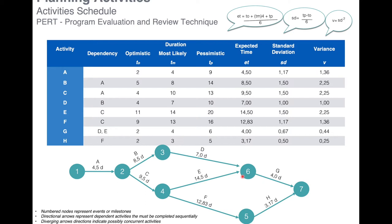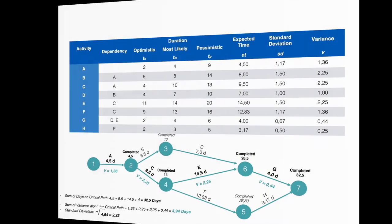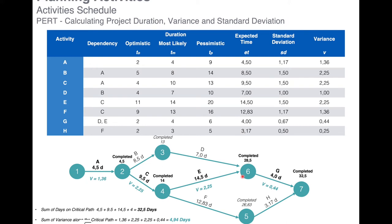Once we've calculated all values, we find the duration along the critical path — the longest sequence of activities to deliver the project. The critical path runs through A (4.5 days), C (9.5 days), E (14.5 days), and G (4 days). Summing these gives a total duration of 32.5 days along the critical path.